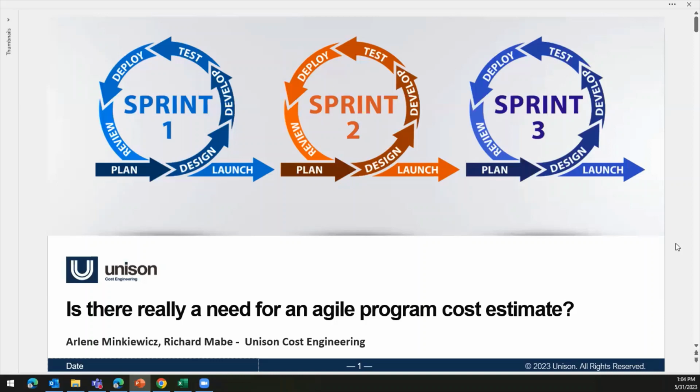Software developers don't generally understand cost estimating, and cost estimators generally don't understand software development. Adding Agile to the mix makes the situation even more challenging. Agile software development practices put the development team squarely in charge of cost estimates for short-term deliverables. And these teams, once they have developed a cadence, can be very successful estimating in this context. Cost estimators have a heftier and less certain responsibility for estimating the software project as a whole, at least for the minimal viable product, MVP, and not to be confused with baseball MVP.